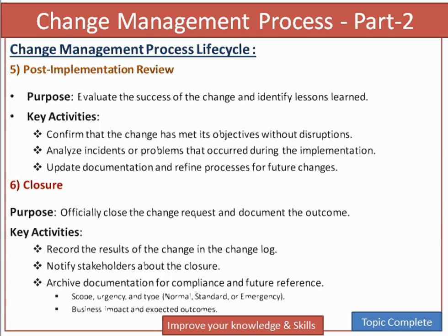Closure. Purpose: officially close the change request and document the outcome. Key activities: record the result of the change in the change log, notify stakeholder about closure, archive documentation for the compliance and future reference. Scope, urgency type like this, business impact and execution process.